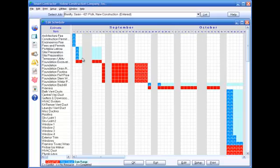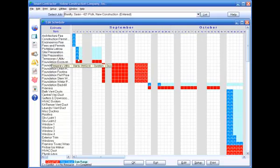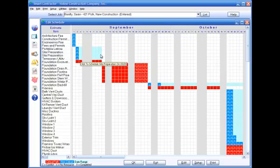Dark blue squares mean that the item is not a critical path item. That means the item can be started and completed any time within the range of the light blue boxes.